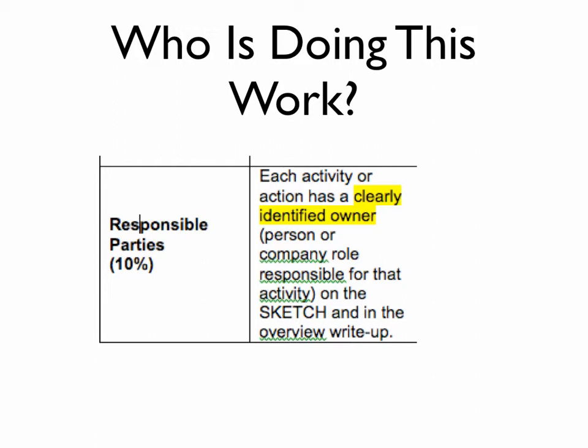During my time in project management, one of the most effective things I could do is when we pulled everyone together as a project manager, and sometimes as a manager of creating innovation in an organization, you don't have a direct hammer over everybody. You're not the boss of everybody. So a great thing to do is to pull publicly on a screen or an email or what have you, a color-coded chart that says action items. You know, that red means it's held up, green means it's a go, and yellow means we're waiting. And if it's somebody's name and there's a red or a yellow, that's kind of a little bit of embarrassment. So make sure that we have responsible parties, and that will really help things move along.